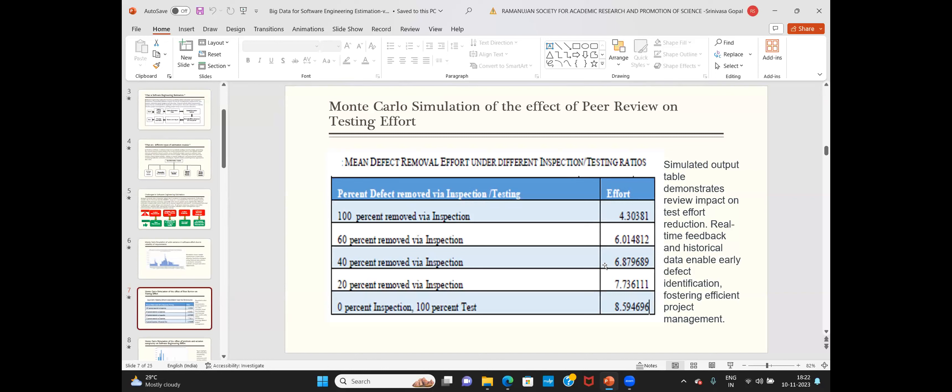These parameters — review vs. no review — are implicit parameters that we have to somehow incorporate into estimation models. They can be mined. These are not formally understood parameters like skill level or complexity, but underlying factors. We can sense that reviews will reduce effort, while doing only testing will increase effort. But there's no guarantee that the models currently in use are capturing these parameters, so we have to figure them all out and add them into our estimation process.